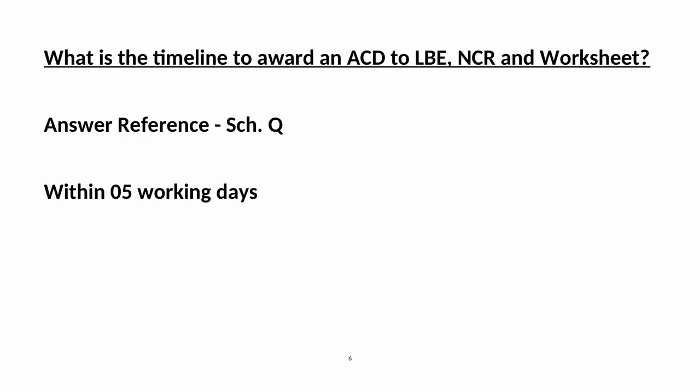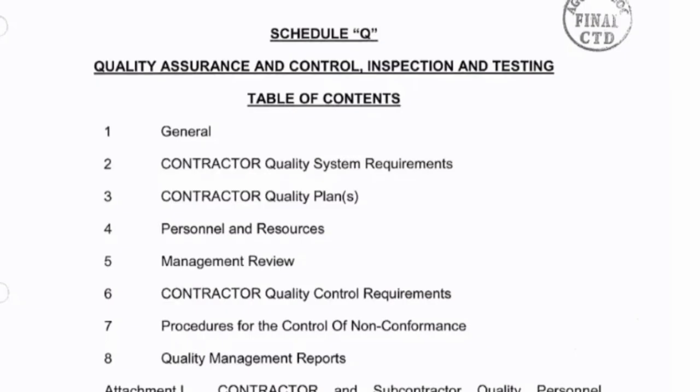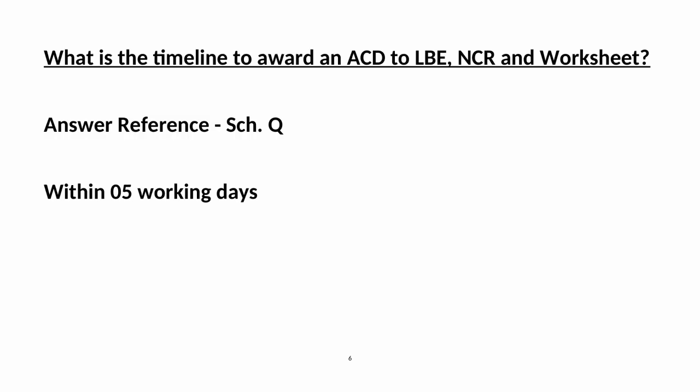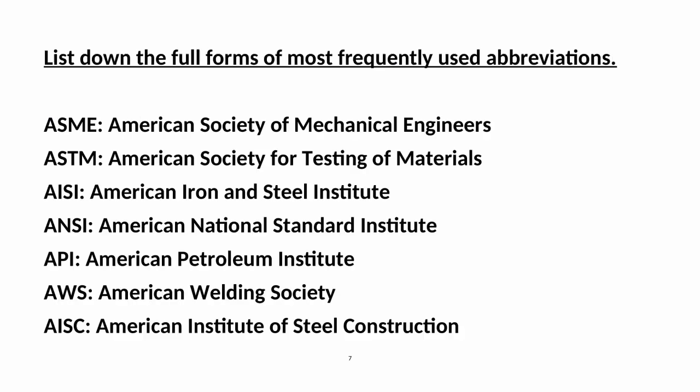Additional minimum documents include: Tally Sheet, Material Test Certificates, Vendor Inspection Report, Inspection Disposition Report, Inspection Release Note, and Delivery Note. What is the timeline to award an ACD2L, NCR, and Worksheet? Answer Reference: SIR Q — within 05 working days.